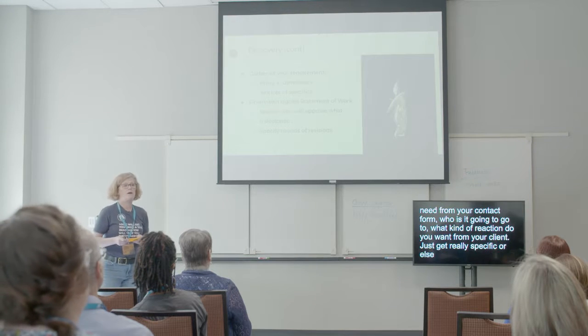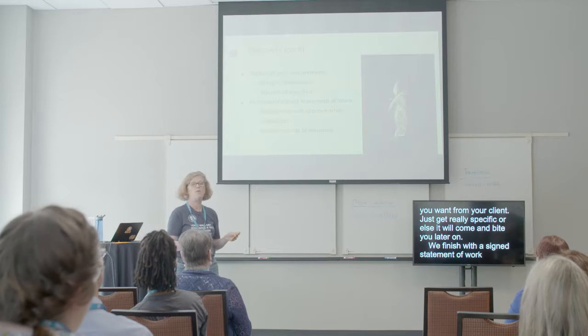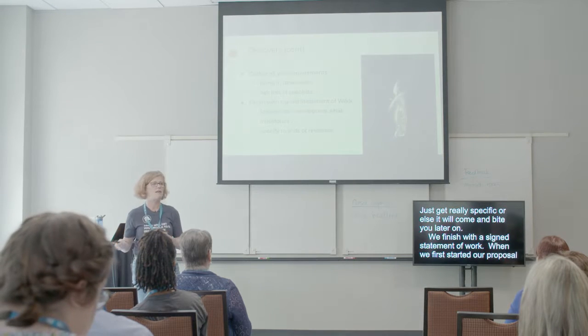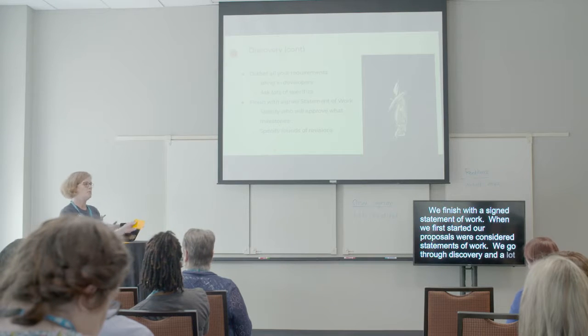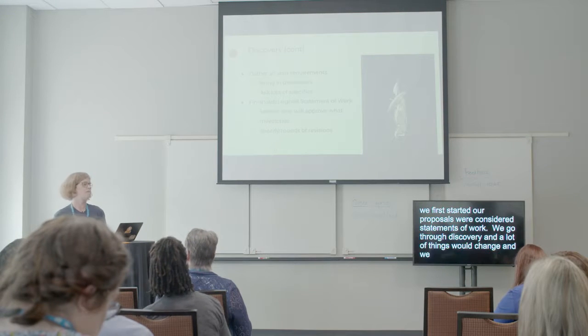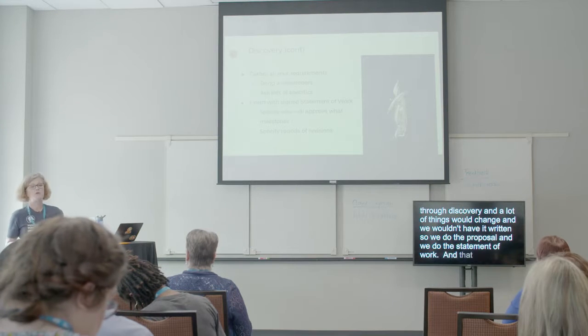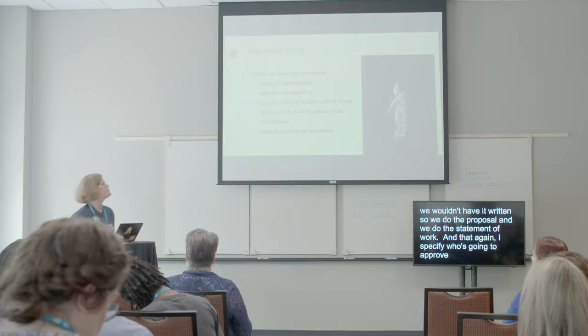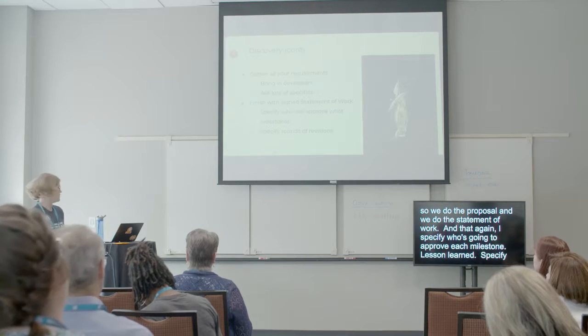We finished with a signed statement of work. When we first started, our proposals were considered our statements of work. We'd go through discovery, and a lot of things would change. And then we wouldn't have it written. So we'd do the proposal, and then we'd do the statement of work. In that, again, I specify who's going to approve each milestone. Lesson learned. Specify the rounds of revisions.